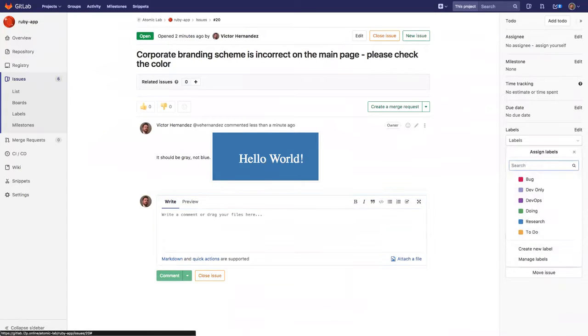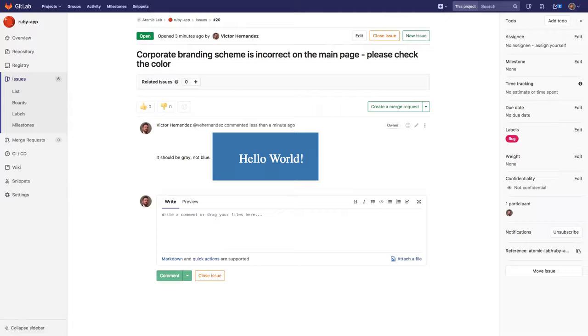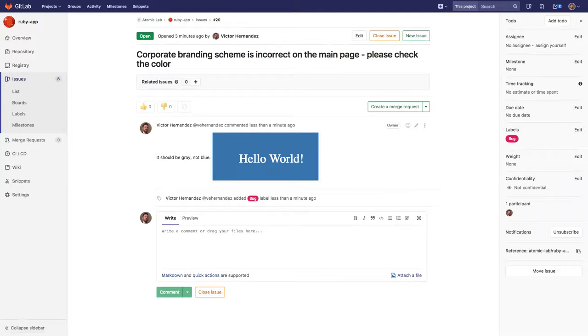It doesn't look like my label took, but labels, whether you're assigning one or many, are something you can define given the right permission set on the fly, or just choose from the selected labels that already exist. In terms of project management as well, weight may be important if we need to associate a certain level of effort that's going to be required. That effort could be story points, could be a rough order of magnitude, or hours. In any case, that weight is going to help us look at issues of different sizes within that backlog.